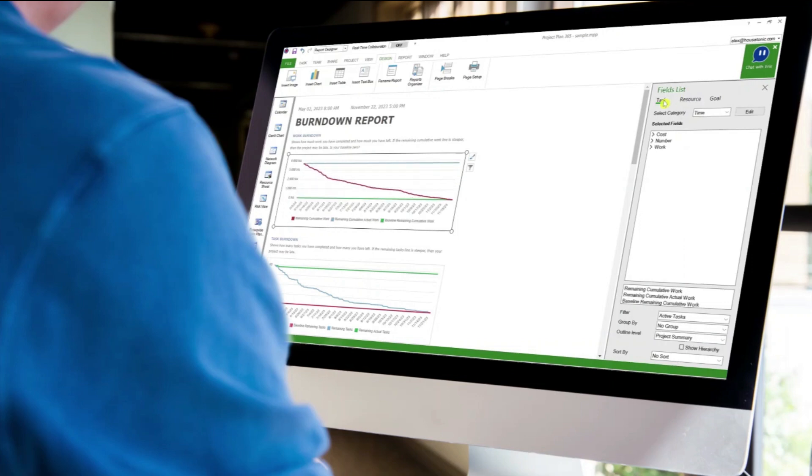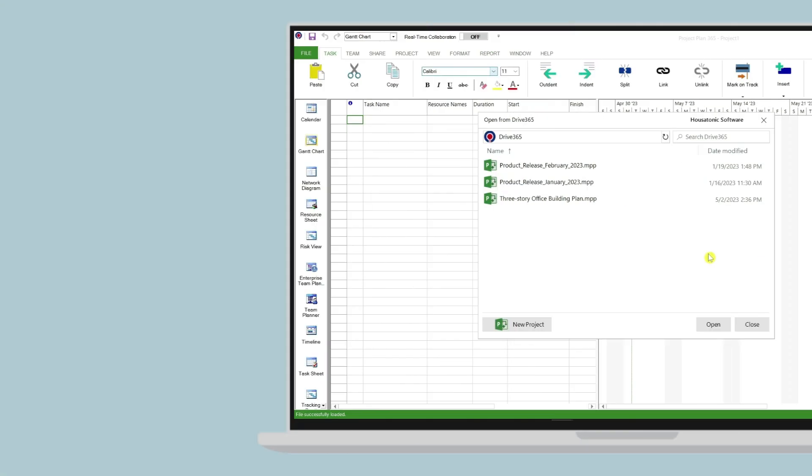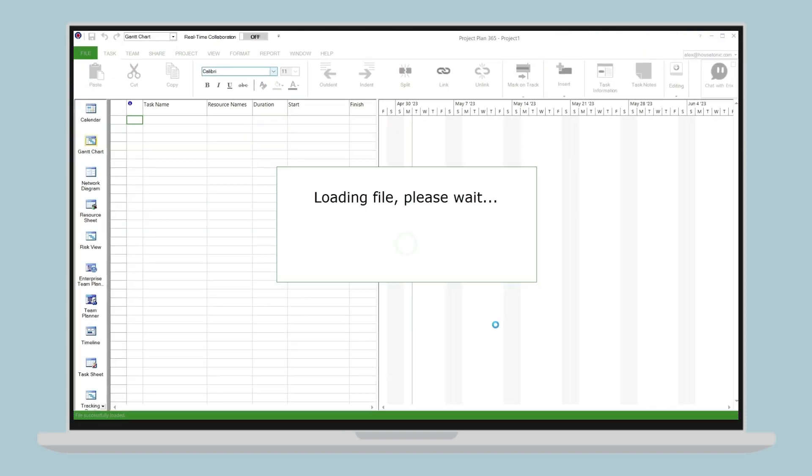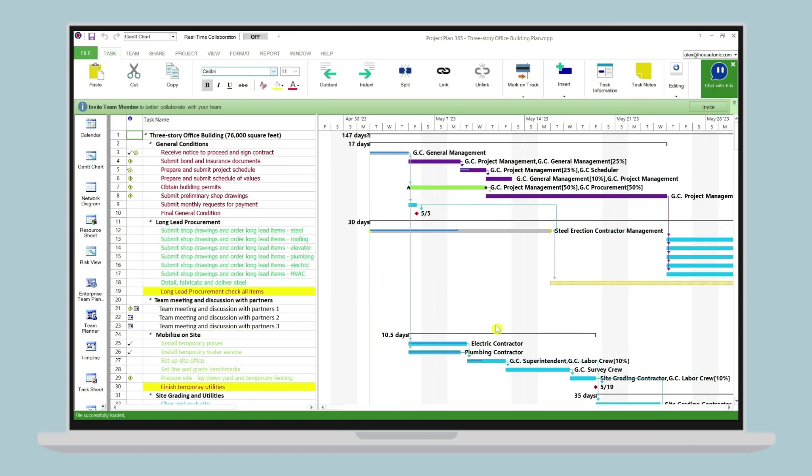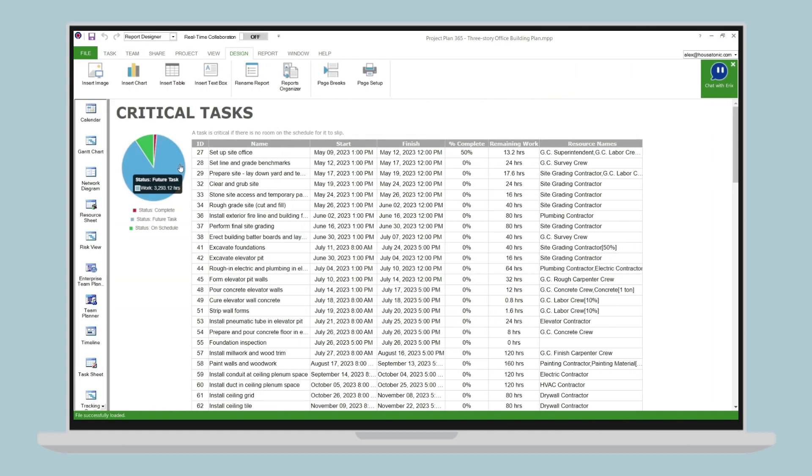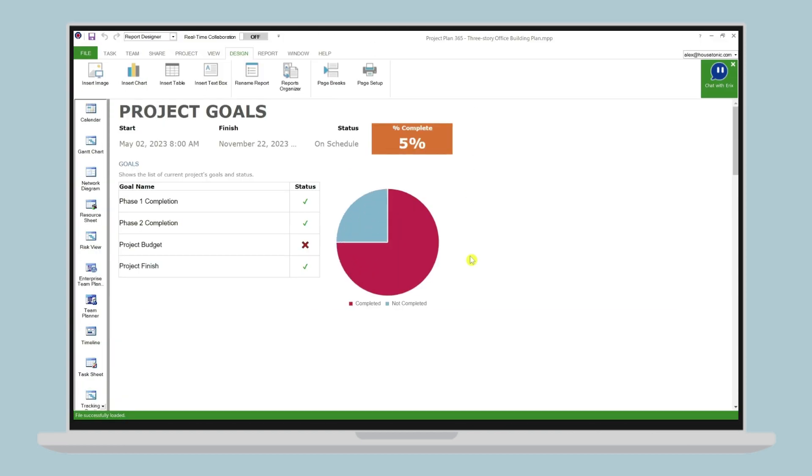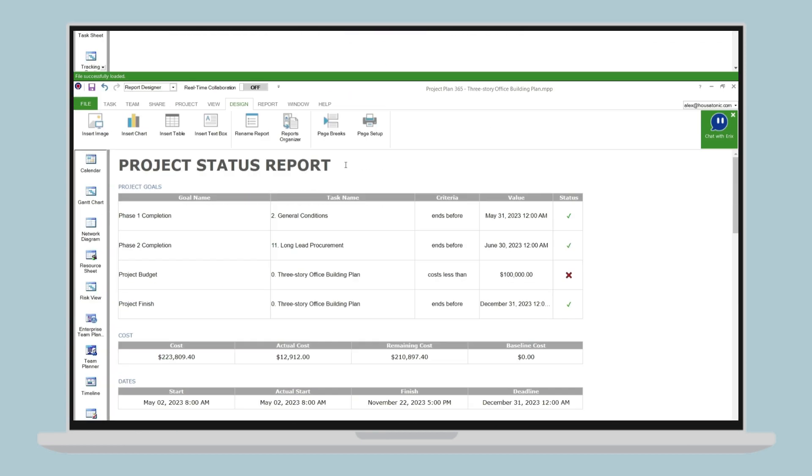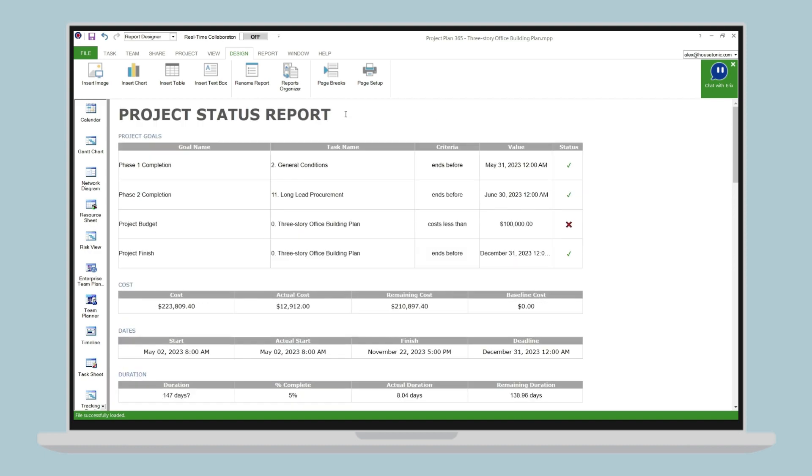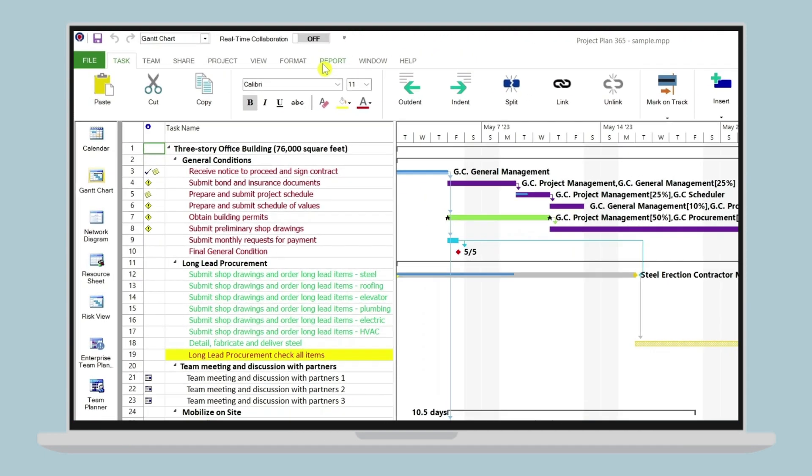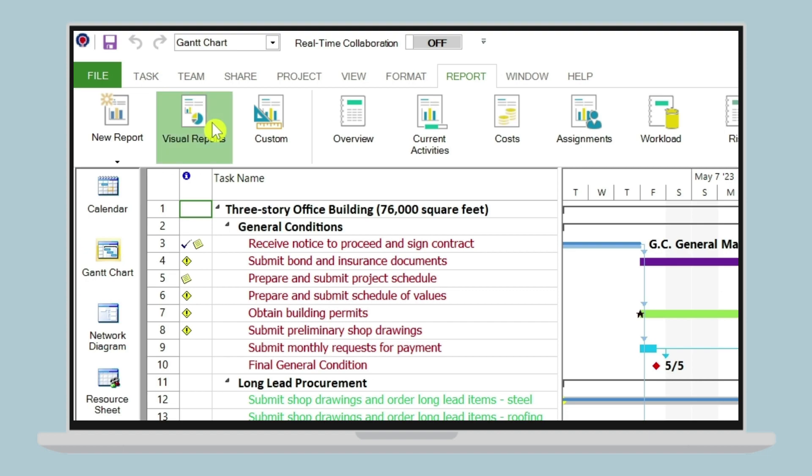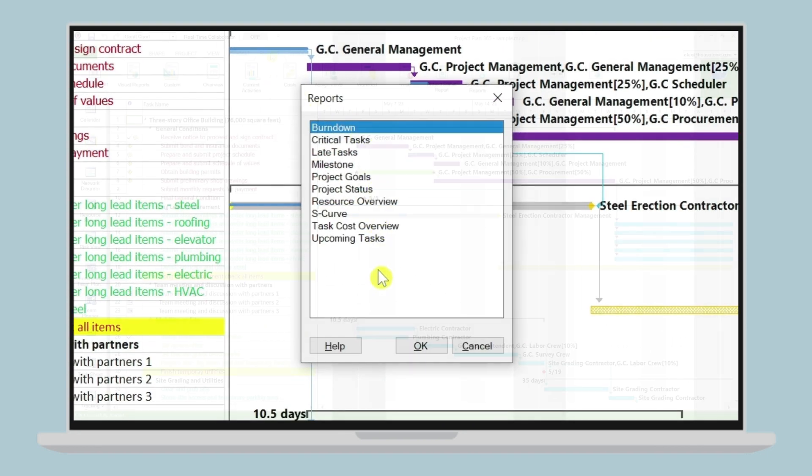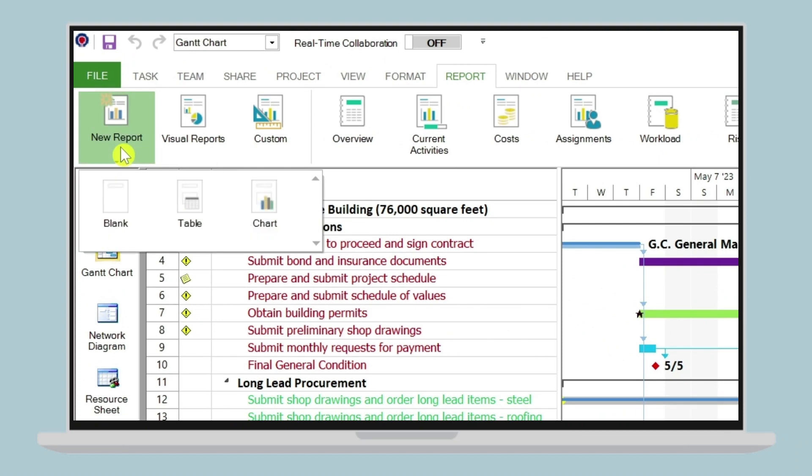Step 1: Select the project and report type. The first step is to select the project and the type of report you want to create. You can either select from various reports such as critical tasks, project goals, project status, and more by going to menu report, visual reports, and select one of our predefined reports. Or create a report from scratch by going to menu report, new report, and select the option that best suits your needs.